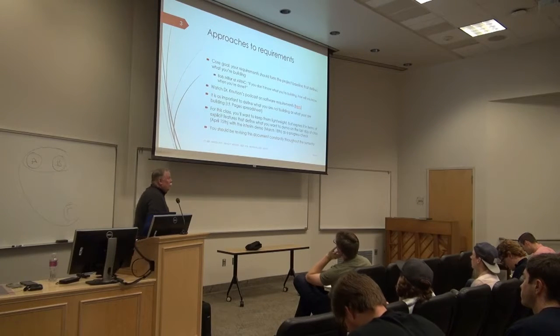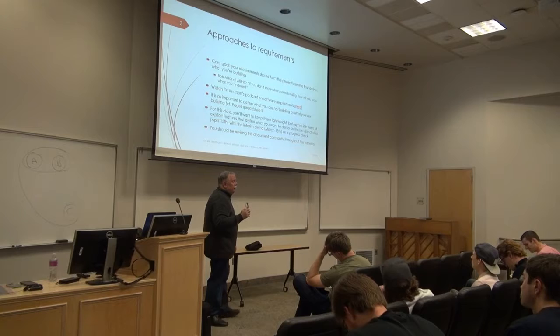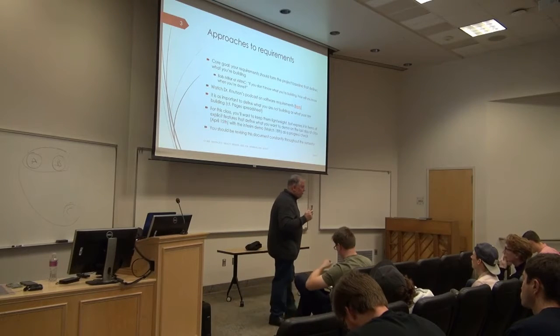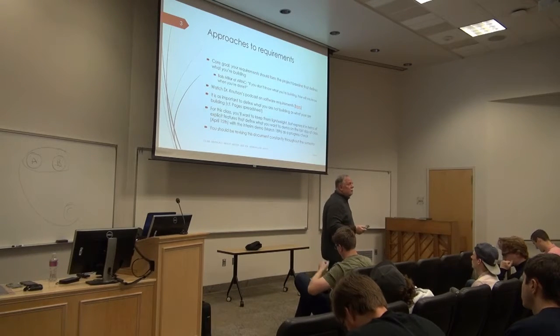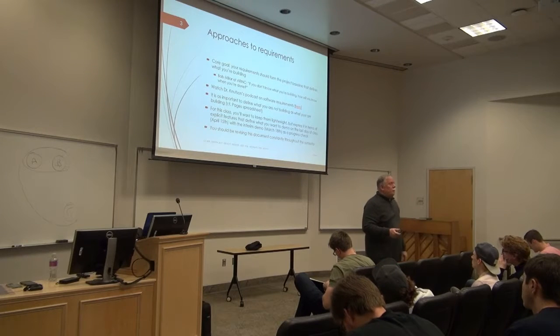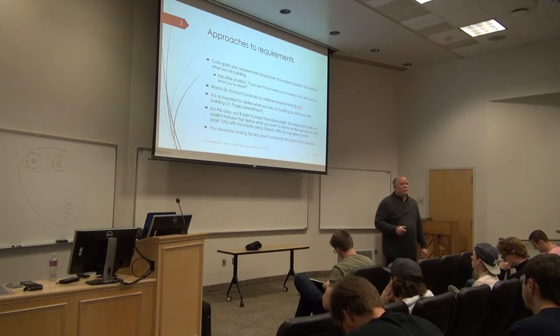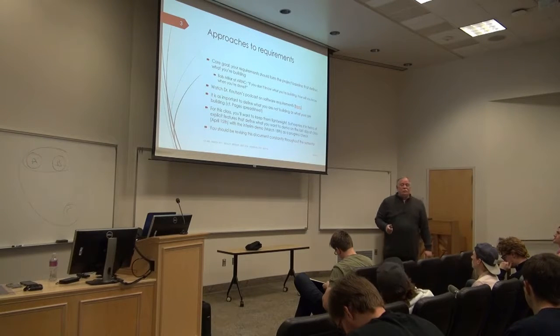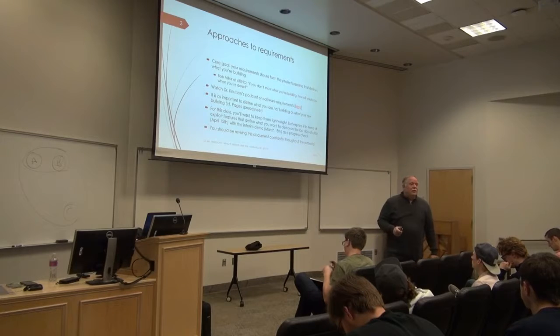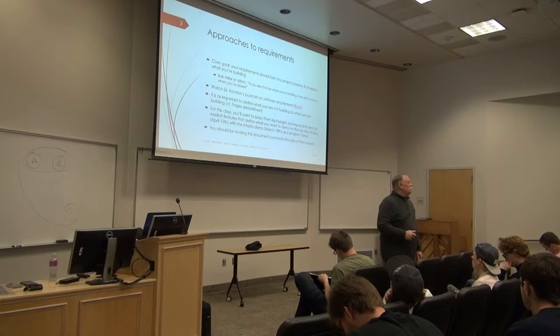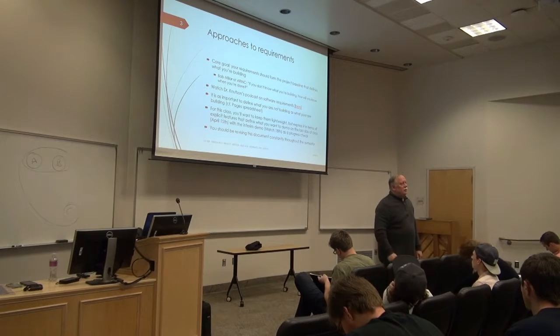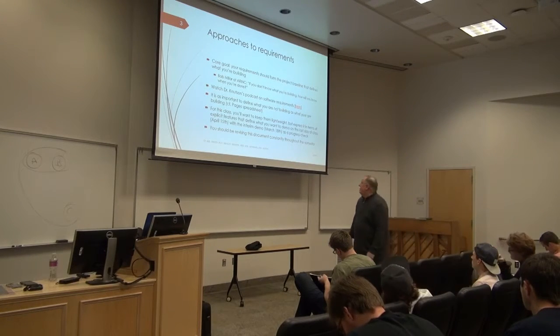So, what you want to do this week as a team, as you're doing your requirement, and it's going to require some serious communications among you. Define what you're going to build, what you're not going to build, and specifically what you want to demonstrate in March and in April. And I tell you, for most of you, as the semester goes along, stuff that you list as you want to demonstrate in March will get pushed off to April. Stuff you list for April will simply get pushed off to the end of the year.